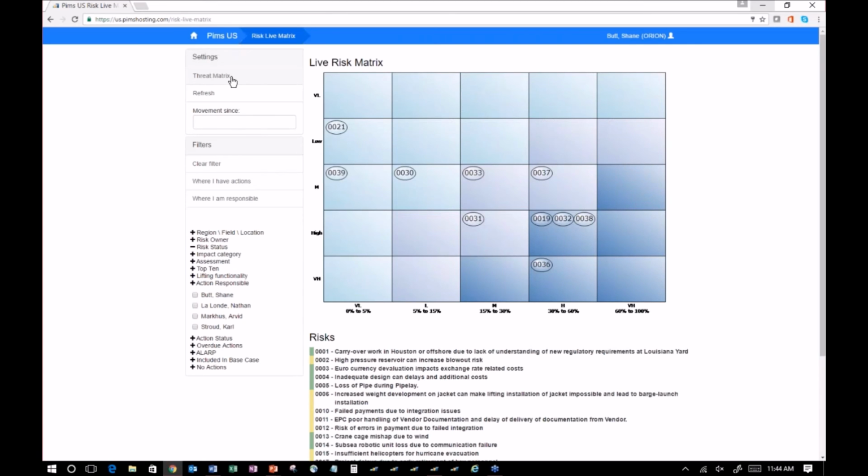All right, so here is a list of all of the opportunities. You can see a different color scheme, a bit more comforting, I would say, light blue to dark blue. So the major differences between this opportunity matrix and the threat matrix is the color scheme, and in fact the consequence axis is inverted.